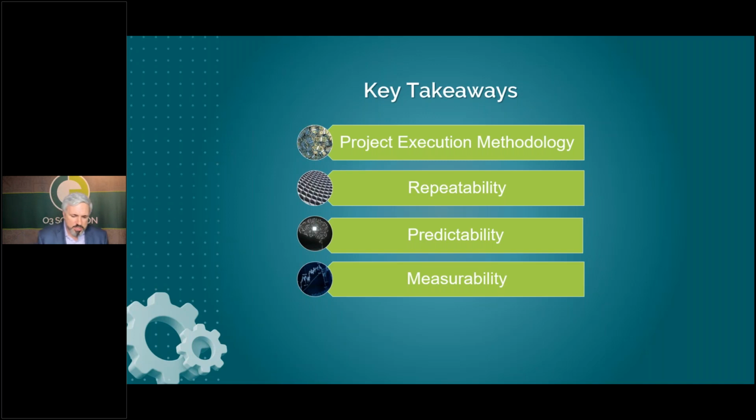And then the other piece is a better, more accurate measurement of the actual status of the project. By moving away from traditional quantities and the S-curve, and looking instead at the closeout and the actual AWP process and an IWP closeout as opposed to just pure quantities, you get a much more accurate view of the status of the project.